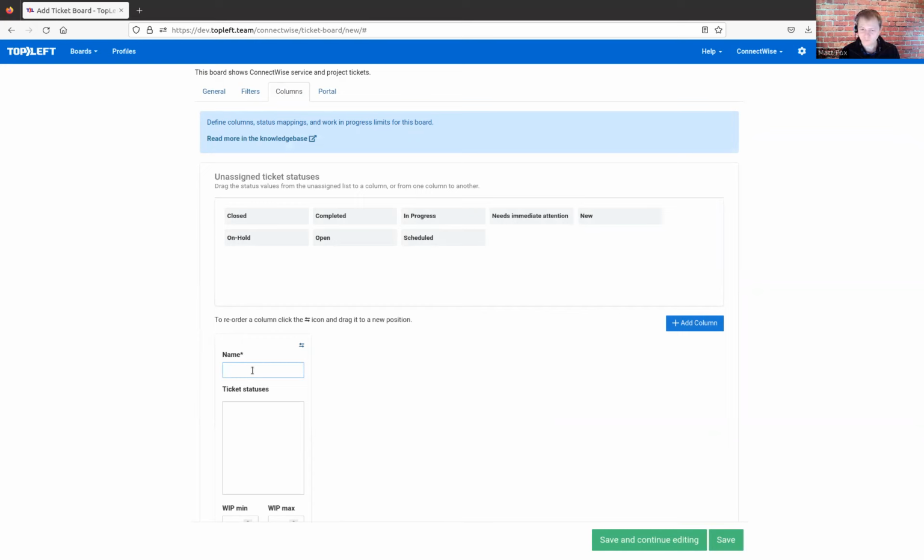The first column, we actually recommend, we call that ongoing. We've found that a lot of MSPs use this pattern. They put one ticket that's part of every project that they make. Every project has the same ticket. It's just called maybe project management, or meetings or communications or something like that. And it's kind of a catch-all ticket that stays open for the whole duration of the project. And you log time against it. Maybe you email your customers from that ticket or whatever it might be.